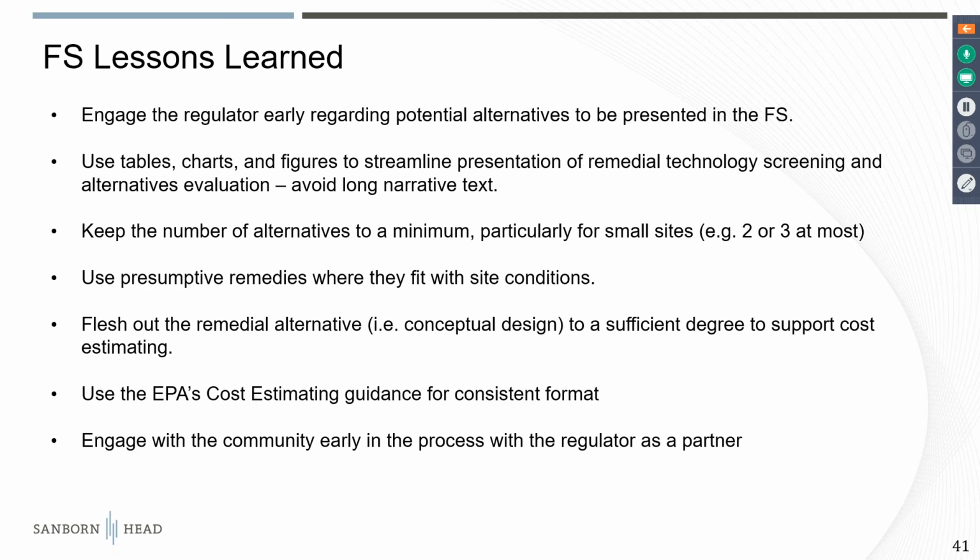But I believe in EPA world, it's still promulgated that you have to use the Treasury Department's publicly noticed interest rate. And I think that's actually come down to like 3%. But you'd have to have a discussion with the people evaluating it to make sure that's appropriate. We were told flat out when clearly 7% wasn't appropriate that we had to use it, even though market conditions said it should be like 2 or 3%. So for non-federal sites, we certainly will use a more reasonable discount rate, something like these days, 2 or 3%.